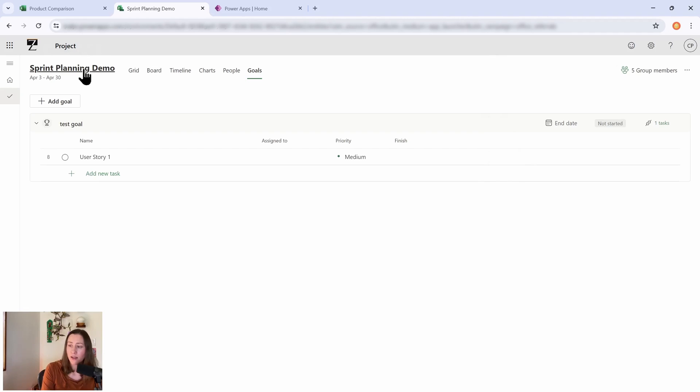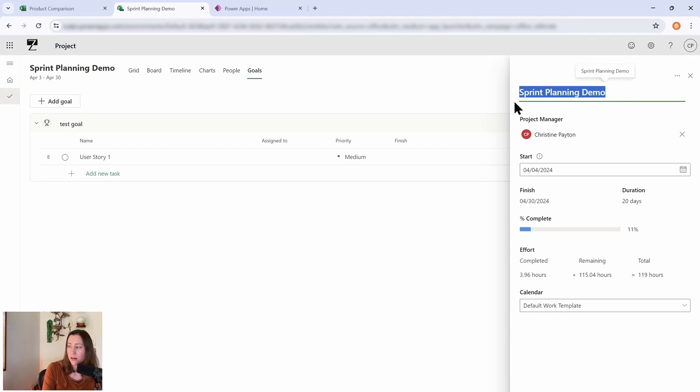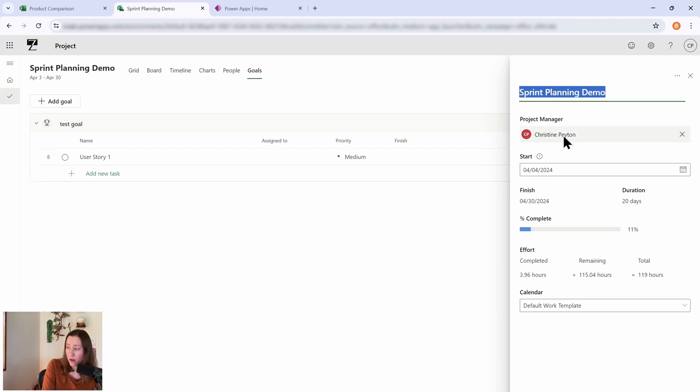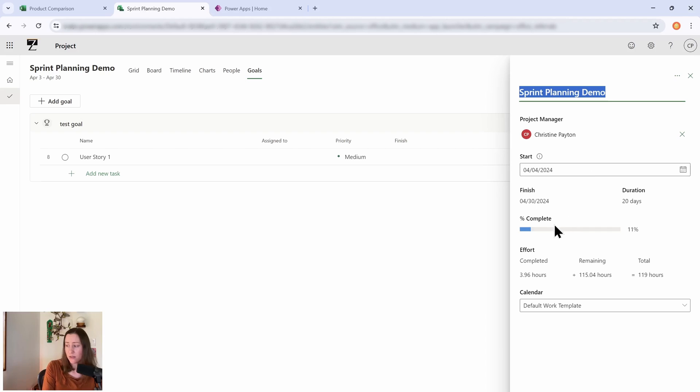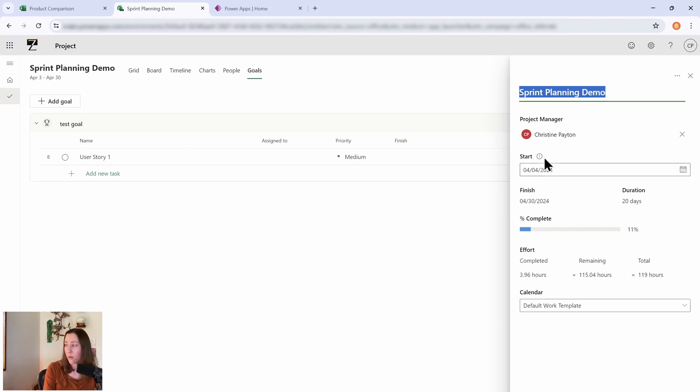And then if I click on the project name here, we get some metadata associated with this particular project. So we can add a project manager, a start date, and then it rolls up a lot of the data from our tasks, so it gives us an overall percentage complete and then the amount of effort completed and remaining for our project.